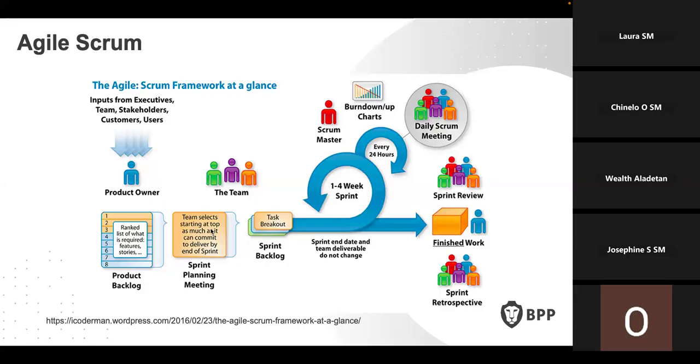Okay, so within the sprint planning meeting, they're going to estimate those user stories, and once they've done that, the team understands, oh, this is the task for now. We'll now have the sprint goal. And once they have a sprint goal, they move on with the task. This is how the task moves. You can see from the backlog, it comes to sprint planning, the sprint backlog, and after that,